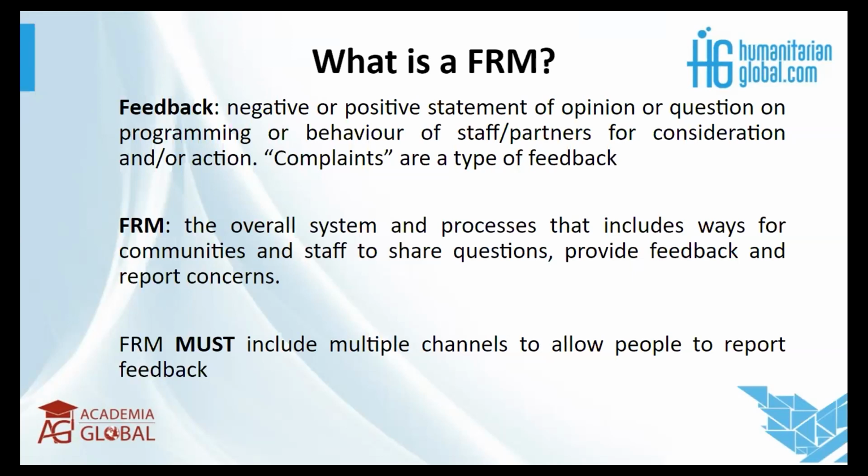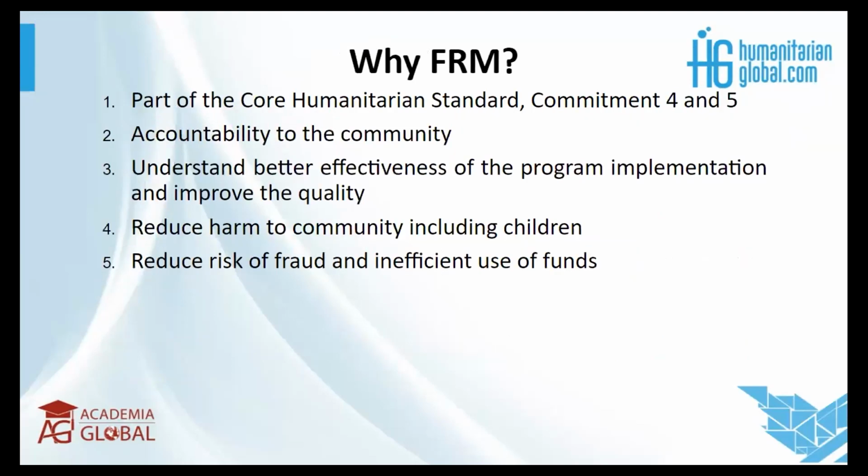For this system to work, we also have to include multiple channels, because remember, we are serving community members who are very different. We have the young, the old, male, female, those who have different levels of disabilities or vulnerabilities, those who are marginalized or minority communities. So we need to make sure that we are inclusive in the modes in which they can provide feedback to us. I hope that is clear, because it's really important to understand that as the basis.